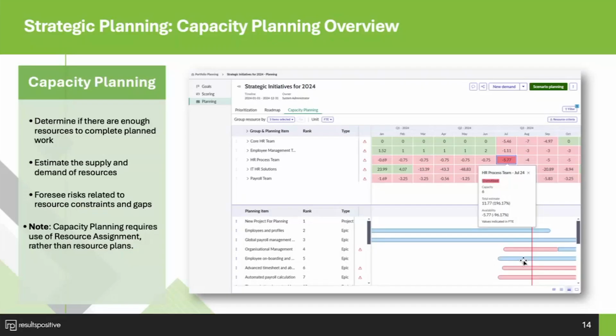If you do it on projects and you have a lot of information, I would typically recommend not doing that. You can, it's just going to take a long time for the system to go and make all those updates. It's basically going to update all of the resource assignment dates. But when it does that, then it's going to update the view up here. And so you might move from having 3 months here of under capacity, and then it might turn green there as you move that particular one out further in the year.